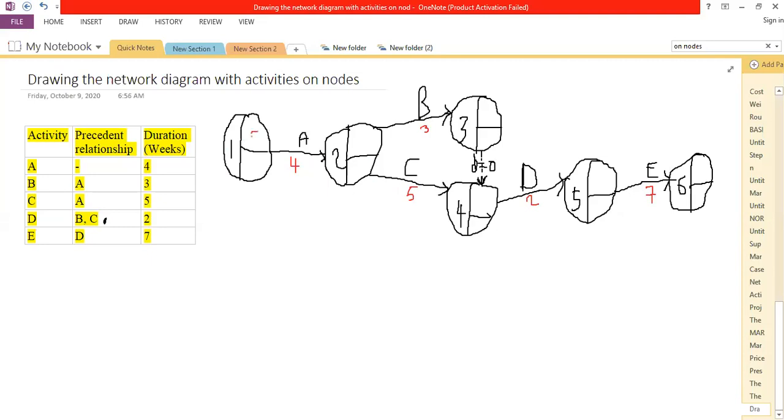So I'll start with activity A guiding us. Remember, the start of the project, the first event here, should always start with a 0 time because we haven't consumed any amount of time. I'll start with activity A to understand the earliest event time for event number 2, or the earliest that we can finish activity A. So we'll have 0 plus 4, this will give us 4, only one arrow, meaning no comparison is required there. Again, here we have only one arrow, so we'll take 4 plus 3, we'll have 7.